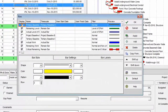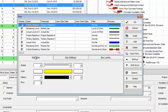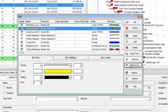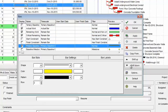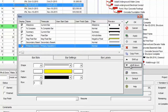Now, these bars are actually your primary baseline bars. You'll notice that the primary baseline bar option is up here at the top. What I need to do is shift this down toward the bottom of this display. So to do that, select primary baseline and hit shift down. I'm just going to move it all the way down to the bottom just to play it safe.